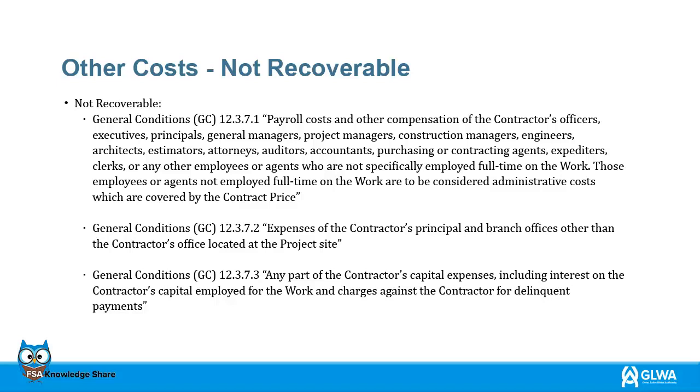12.3.7.1 Payroll costs and other compensation of the contractor's officers, executives, principals, general managers, project managers, construction managers, engineers, architects, estimators, attorneys, auditors, accountants, purchasing or contracting agents, expediters, clerks, or any other employees or agents who are not specifically employed full-time on the work. Those employees or agents not employed full-time on the work are to be considered administrative costs which are covered by the contract price. General Conditions